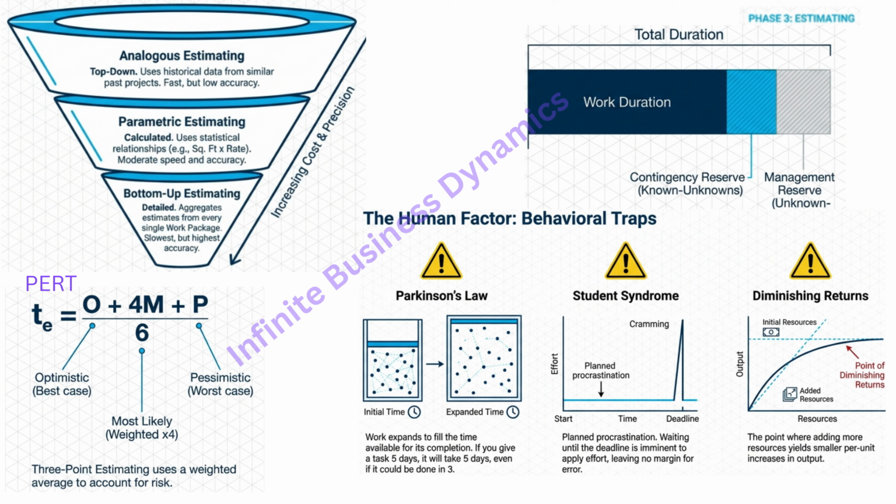But for complex, messy work, the gold standard seems to be bottom up. Yeah. You go back to that WBS, you look at every single tiny work package, you estimate them individually, and then you roll them all up. It takes forever to do, but it gives you the most accurate number. But even then, a single number, this will take 10 days, is usually wrong.